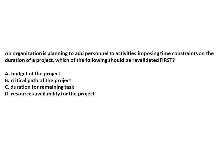Question: An organization is planning to add personnel to activities imposing time constraints on the duration of a project. Which of the following should be revalidated first? The answer is the critical path of the project. The critical path must be revalidated to ensure that the additional resources will in fact shorten the project duration.